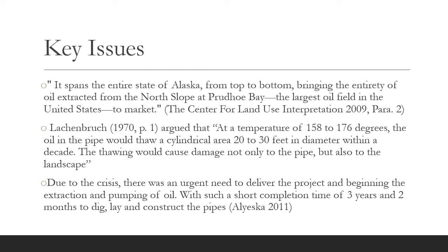During the construction process, safety concerns were booming, as the work included working in the Alaskan winter, where temperatures could reach -70 degrees, and construction continued through months of perpetual dark in the winter. Due to the remoteness of the wilderness, highways were built for the construction crew just to get to their job site. However, the internal system was not the only concern, as environmentalists feared the pipeline leading to a disastrous spill, which also led to conservationists rallying against the pipeline, saying that Alaska must remain an untouched wilderness.